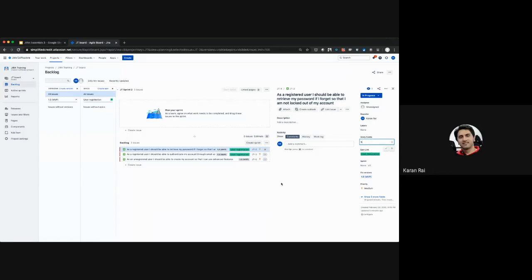Brian, for this particular story, the forgot password, with regards to the question of the third-party integration for the mailing system, I guess the complexity would depend on which story is already implemented before. Let's say in a previous story, we already have third-party email integration. Then we don't need to do that again. So the complexity is lower than if it's higher. Yeah, absolutely valid point. And that's exactly the kind of argument you would present to align or bring the story points back to 5, for instance.